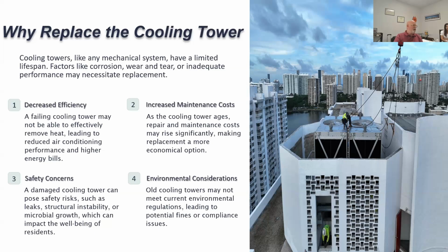A cooling tower is something that's going to be manufactured almost specifically for your building. So it's not something you're going to be able to order and have here next week. So if you have a catastrophic failure, you're going to have to jump through a lot of hoops finding temporary towers out there and everything else. So that's a consideration.